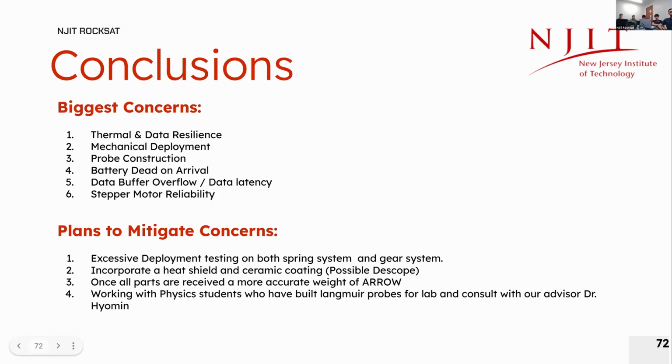Some plans to mitigate those concerns will be excessive deployment testing on both the spring system and the gear system, and incorporating a heat shield, but it will possibly be descoped. We'll talk about that further in the next slide.